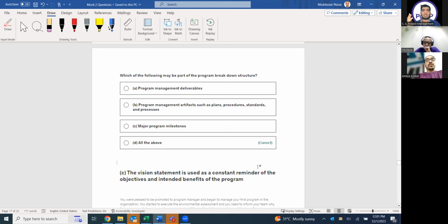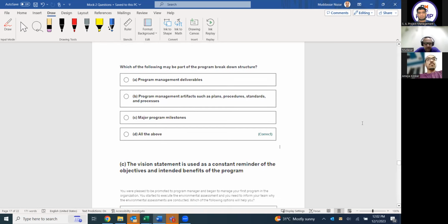And the difference between the roadmap and the schedule was that the program roadmap will have only the milestones, right? But here the schedule can have detailed activities under that. So the schedule is coming from the WBS, same as the scope we have in the PMP. Okay, understood.